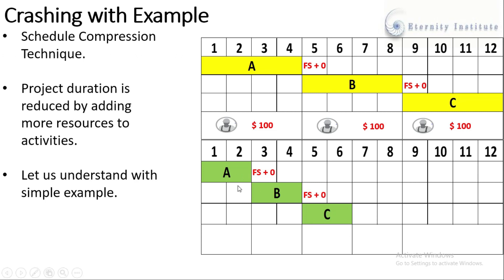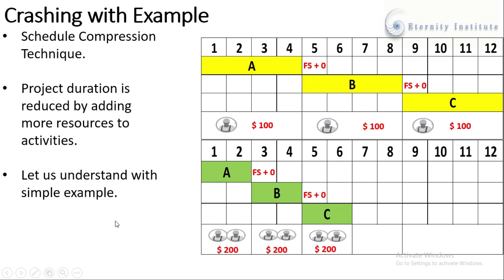These are the crashed activities. The duration of Activity A has now become two days, the duration of Activity B has become two days, and similarly the duration of Activity C has now become two days. This was achieved by adding more resources — in the previous case we had one resource, and here we have two resources.